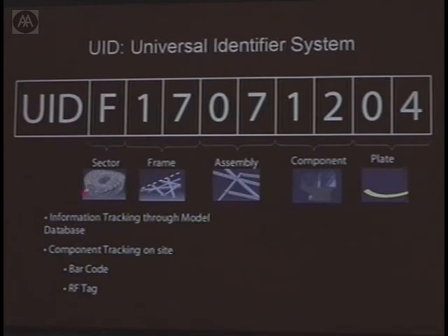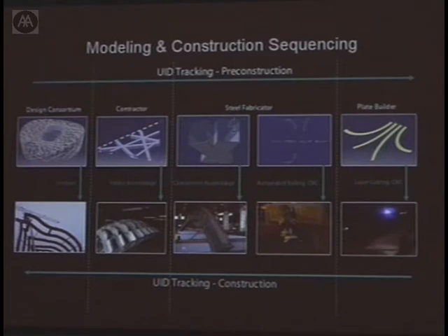And that goes from the layer of the individual plate to the component, which is an aggregation of plates, to the assemblage of frames into this overall piece, so that you can argue that there is a reciprocity between pre-construction at all the different levels of operation with the actual construction process itself, meaning that you're lasering out plates, bending them, welding them together, and assembling them.